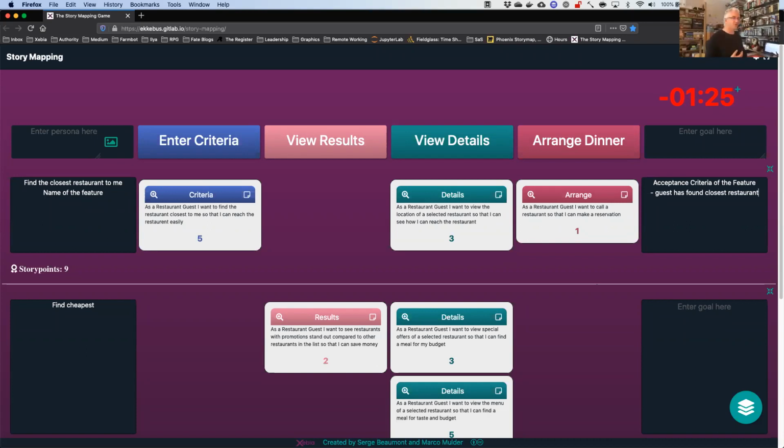So the other question is, how does story mapping work or plan if there is commitment-based planning or a fixed schedule? Now, of course, if you have a fixed schedule, that means you have to vary your scope, right? Because you have a fixed deadline. So what's the tweaking you can do? You have to figure out how much functionality, how much stuff can I fit into my fixed deadline? And that's exactly what this tool is for.